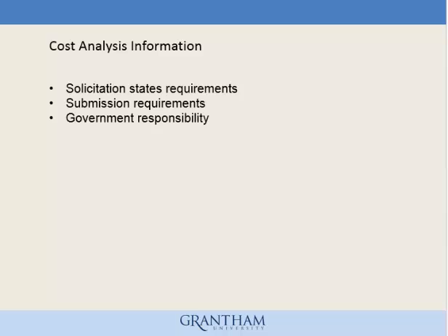The solicitation must specify whether cost or pricing data are required. It must state that the offeror may submit a request for exception from a requirement. The solicitation must state whether information other than cost or pricing data is required, if cost or pricing data are not necessary.